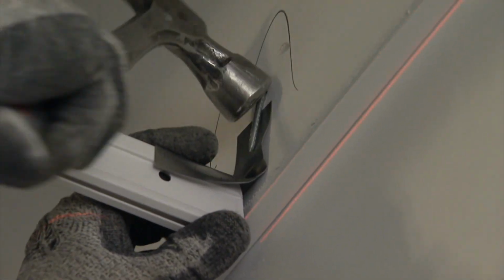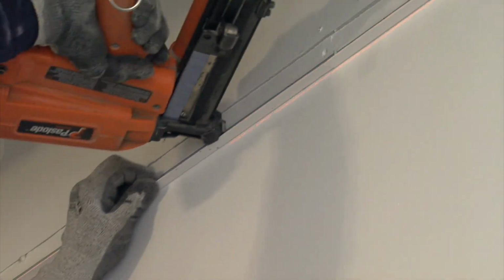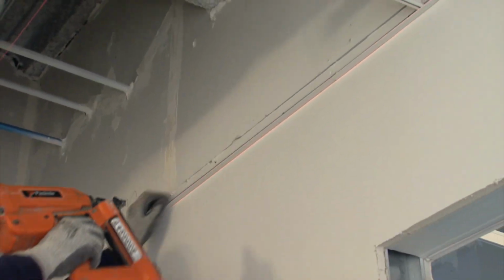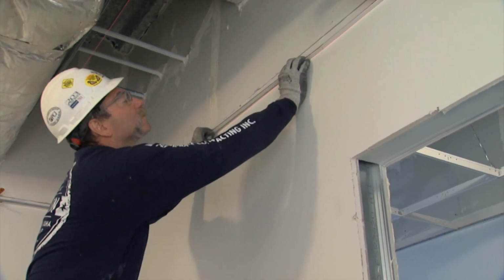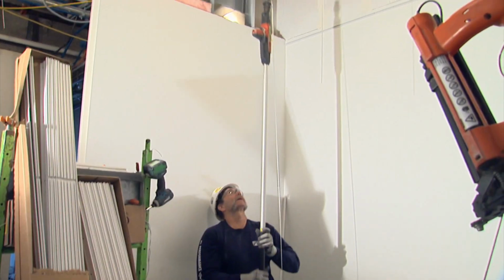The most important thing you do at the beginning is you have to establish the ceiling height. And so establishing a ceiling height, you have to get your sheet metal contractor, your electrical contractor all involved to make sure that you have the proper clearances to get their pieces in after you're done with the acoustic part of it. So you lay your pattern out on the floor, mostly because it's more productive to do it that way rather than try to be up on a scaffold and moving around. And then you can take it and you just plumb your marks up to the molding on the walls. After you do that, which establishes your molding around the perimeter, then you shoot all your hangers.